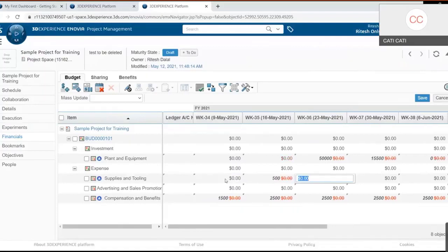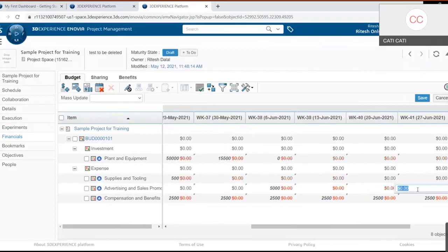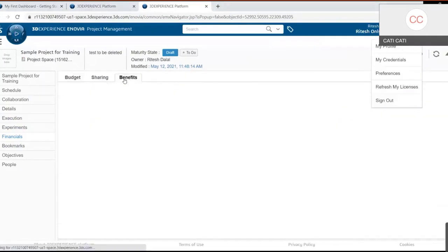So once all these budgets are entered in, you have the ability to lock them. That means that now that budget is set. You cannot change it. You cannot do anything to it. All you can do to that budget now is track against it. So that'll be actuals. That's your actual transactions then. And I believe we'll get into that.